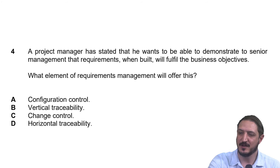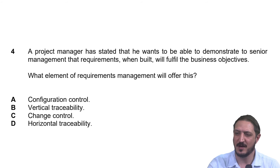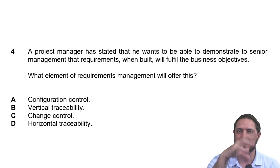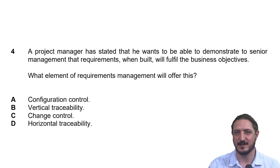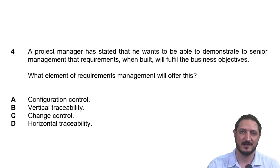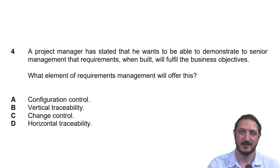If we take a look at this question now, we need to establish that it is talking about requirements management — the broad area of knowledge. It asks what element of requirements management will offer this. We have a project manager demonstrating to senior management that requirements, when built — after elicitation, analysis, and the whole process — fulfill the business objectives. The solution is now supporting and moving the business forward in terms of its objectives, which also supports the business strategy. This indicates we are talking about vertical traceability.